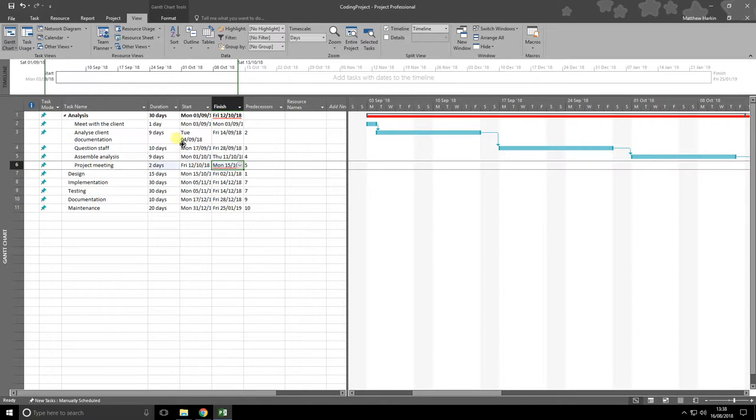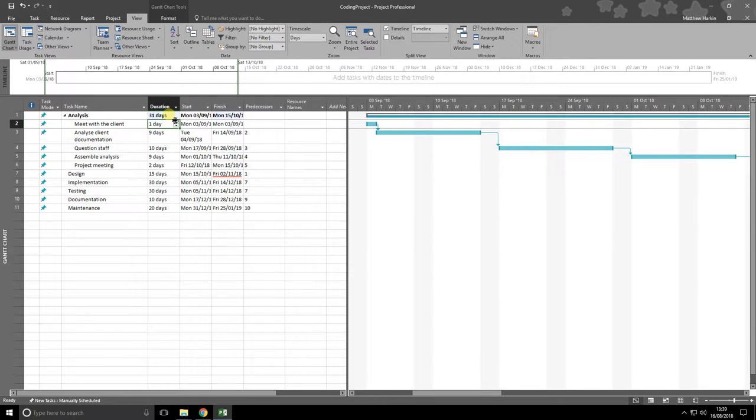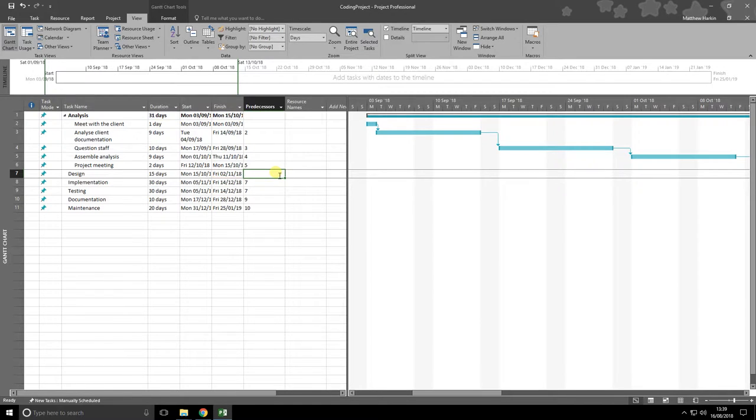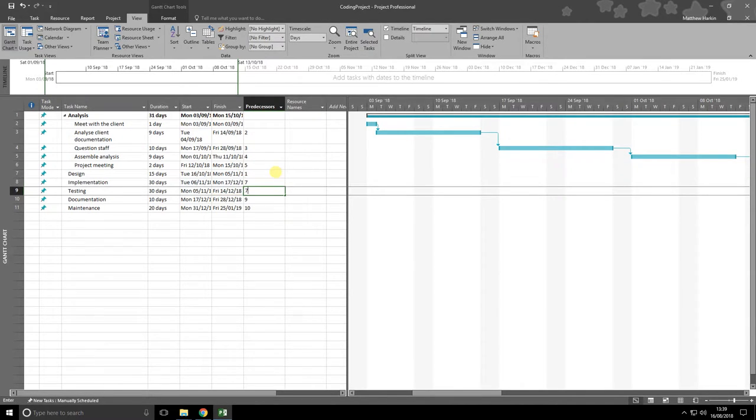What I should have said was, look at your days and add them all up. You find this all adds up to an extra day, which is 31. So if I made that 31 instead, that sorts things out. That sort of thing can potentially happen quite a lot. And again, if something else goes wrong, I just go back and fix the predecessors and see what happened. That one was a 7, so make it a 7 again.